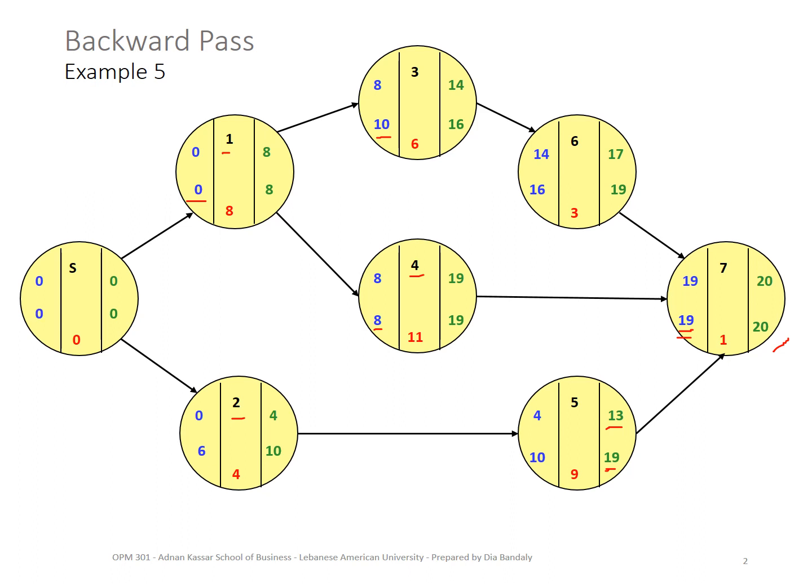It's not by coincidence that we are seeing zeros all over the node here. Why? Because that was a virtual node, so you expect that, right? In a virtual node, all the values are 0. If you find any value which is not 0 here, make sure that you have made a mistake somewhere, and you need to revise your calculations.